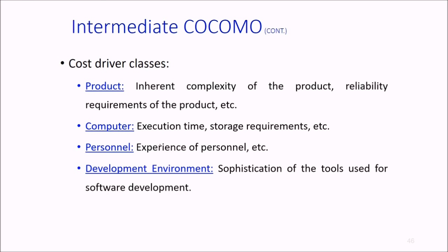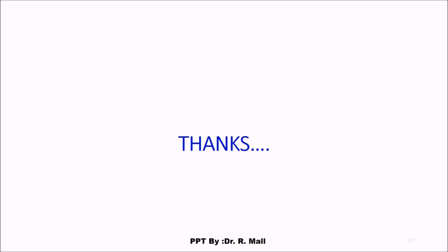So what are these cost driver classes? First is product: the inherent complexity of the product and the reliability requirement of the product. Computer means execution time and storage requirement. Personnel means experience of personnel. Development environment means sophistication of the tools used for software development.